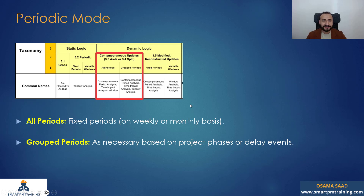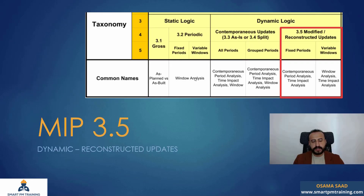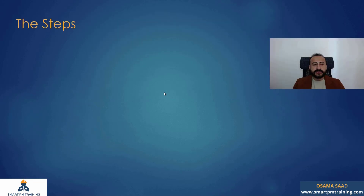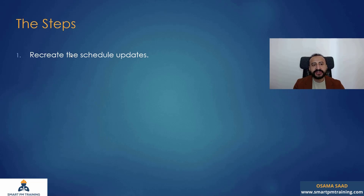And this is it for the MIP 3.4 dynamic split. The MIP 3.5 is very similar to the 3.3 and 3.4 — in the MIP 3.5 it's reconstructed updates. You use this method if you want to reconstruct schedule updates for any reason before you implement the analysis method. The first step is to recreate the schedule updates, then implement the analysis according to MIP 3.3 or 3.4.